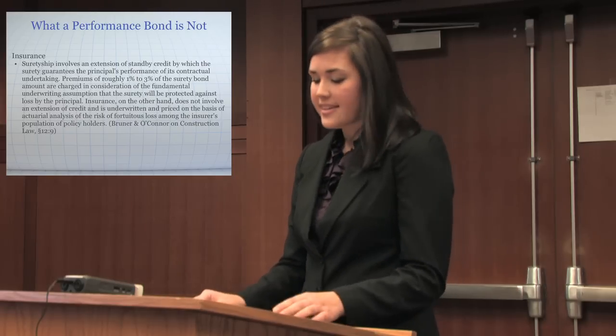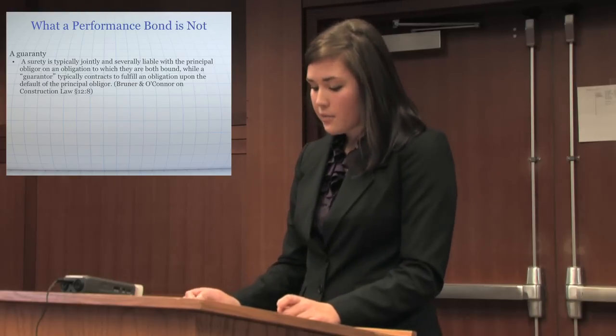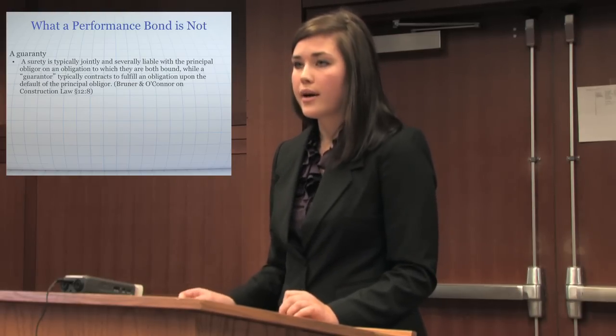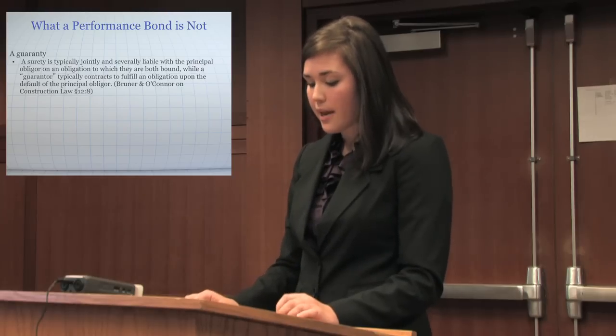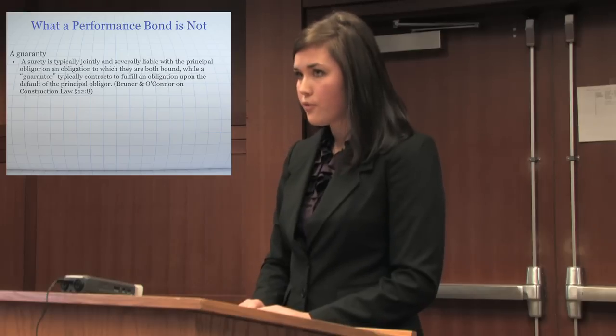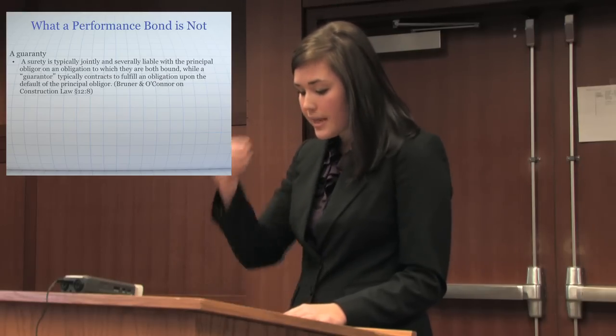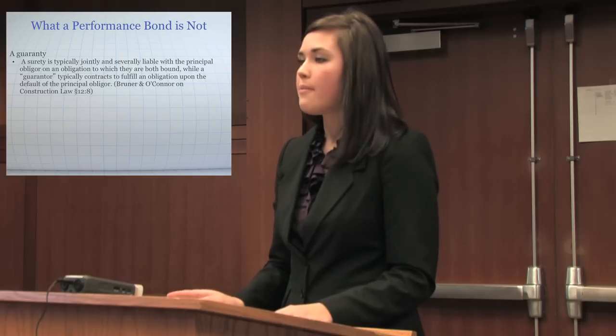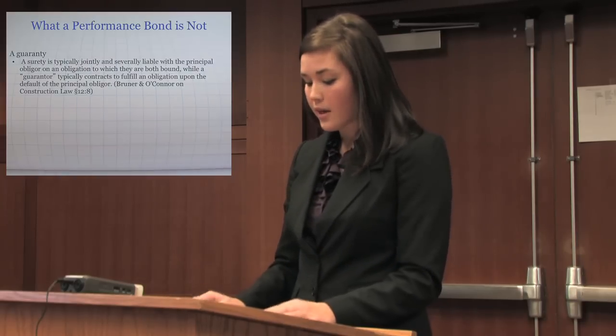A performance bond is also not a guarantee. A guarantee relationship does have three parties; however, the guarantor doesn't come into the party relationship until after the contractor has already defaulted on performance. In the guarantor relationship, the guarantor steps up and promises the owner that he will fulfill the obligation. A surety, on the other hand, is jointly and severally liable with the contractor from the very beginning of the surety relationship and liable for any default that the principal makes.